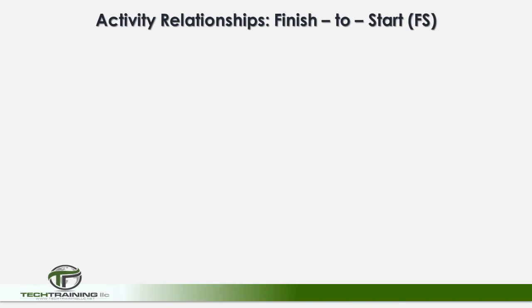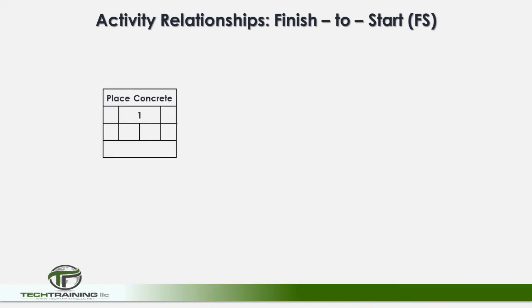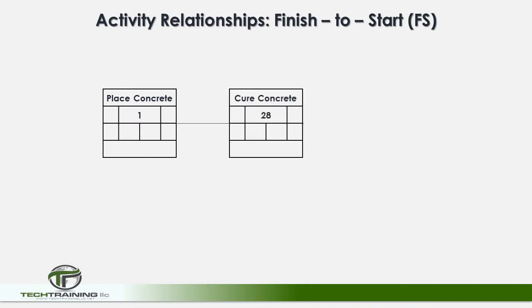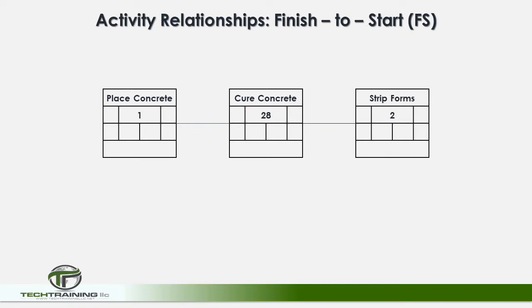Our first activity is to place the concrete. The next activity is curing the concrete, which takes 28 days, and then the last activity is stripping the forms, which is going to take 2 days.